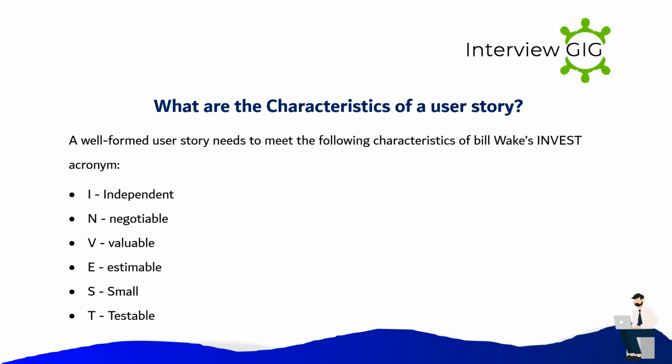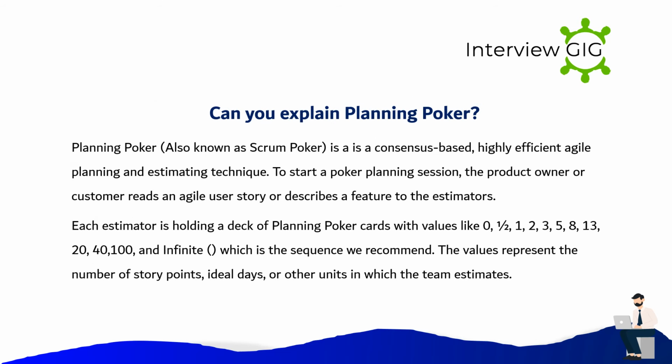What are the characteristics of a user story? A well-formed user story needs to meet the following characteristics of Bill Wake's INVEST acronym. I: Independent. N: Negotiable. V: Valuable. E: Estimable. S: Small. T: Testable.